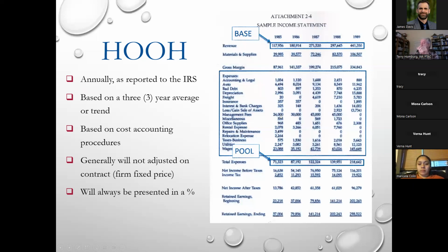So for example, if you have a project manager and you assign them as a direct cost, you cannot also report their salary as management in your G&A, okay?